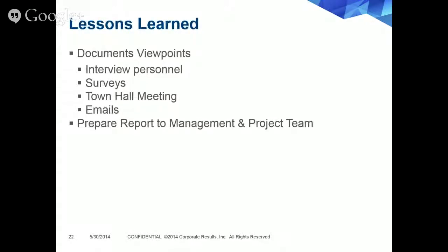Okay, and then we do a lessons learned. So it's important to conduct a lessons learned for future projects. So we want to focus on what worked and what didn't work and why that is. So we touch on interviewing personnel to see what they would have changed within the project plan or the testing or basically the overall upgrade. If they have any recommendations, we do surveys, just a quick email survey, and we've conducted town hall meetings, where people just express their concerns about going live or express something that they would like to be changed next time.